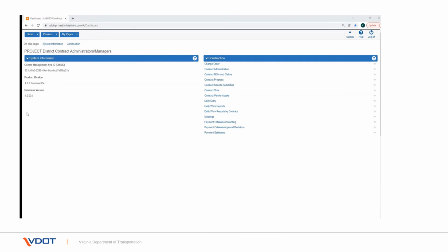In this video we will walk you through the process of adding a subcontract and subcontract items. A subcontract is a contract between the prime contractor on an agency contract and a third party. The subcontract assigns part of the work in the original contract to the third party. You can divide subcontracts into items and define subcontracted quantities. Each subcontract item can have a partial item percentage applied to it, which indicates that the subcontractor will perform only part of the item work.